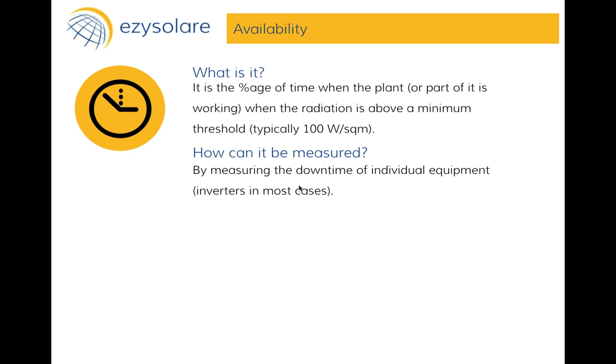If you want to compensate by the EPC contract value, and this is very common in case of megawatt scale power plants, you are able to recover 16,80,000 rupees upfront, which means that you have been able to reduce the cost of the power plant in the same ratio that your performance got reduced, so that your returns are still unchanged.